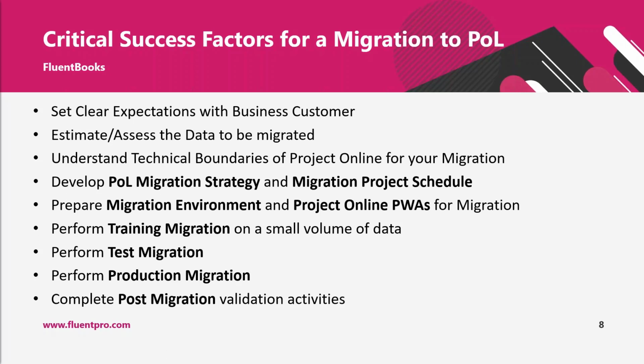After the test migration is done and there are lessons learned and mitigation plans created, it will be time for production migration. And after production migration, there are usually some post-migration activities that include validation, and trainings for users, for business users, and for super users who will be administering the environment.